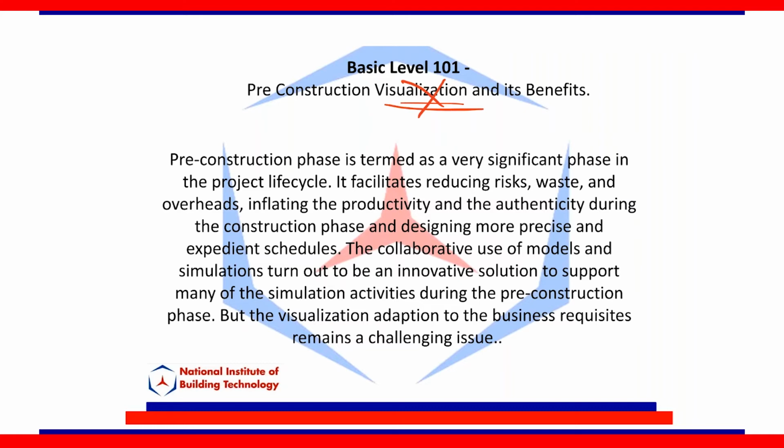And when you do that kind of package, and if you get hired, it's still pre-construction. So anything that is prior to actually physically constructing is all pre-construction. So planning of materials, planning of procurement, planning of how to bring in material, planning of what schedules to run, and things like that. It's all part of pre-construction. It's planning. It's really the full picture: planning, designing, logistics, whatever you can call it. Anything that is prior to construction is pre-construction.